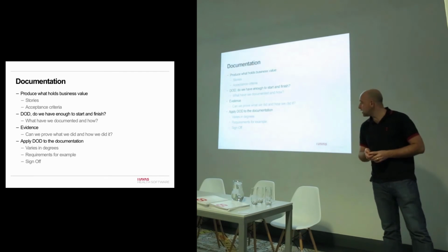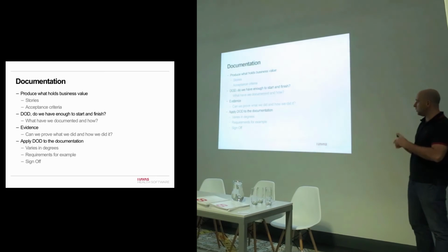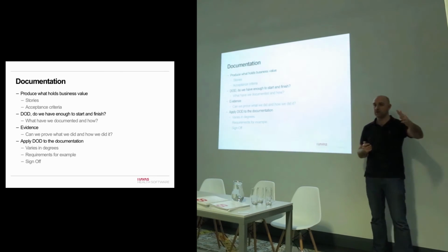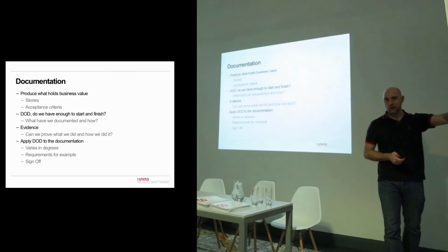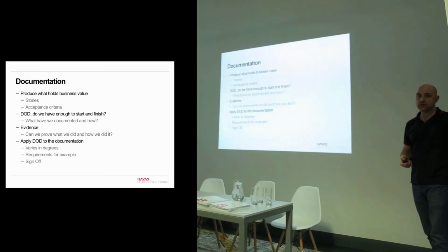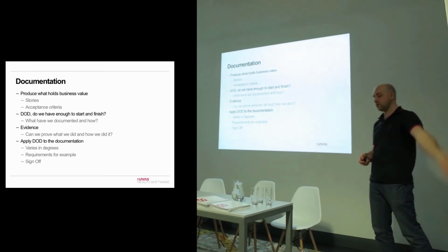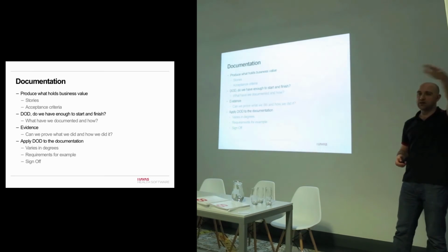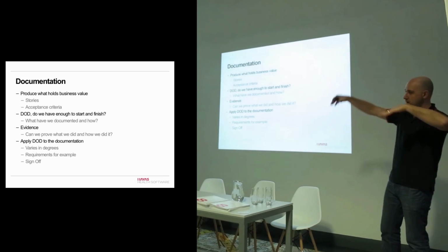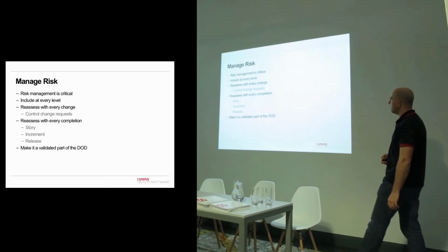So the other thing as well is that sign-off is really important. It's a really important part of the definition. Make sure you're signing off. Who's signing off? How's that working? Has your business owner signed off on requirements? Has your software engineer signed off on requirements? Has your engineer signed off on what's being delivered? You need that traceability. You need to say who did what and how they verified it.